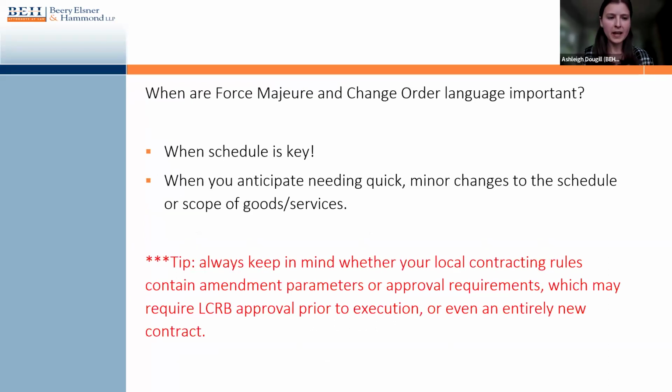So this is just to reiterate what I already said, which is when are force majeure and change order language important? It's important to think about including these when your schedule is very important to you, when you have a strict schedule, or where you anticipate needing quick, minor changes to that schedule or scope of goods or services. Where you have these factors, it is really important to consider adding the force majeure and change order language.